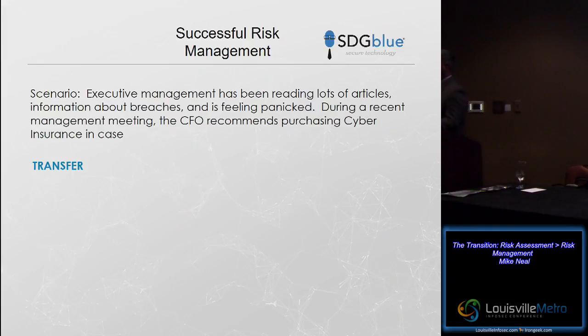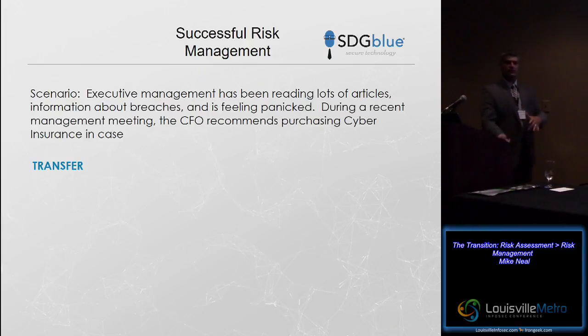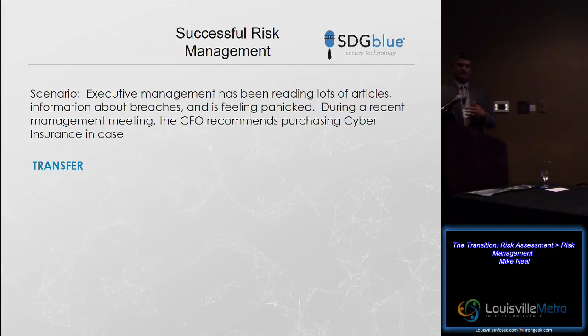So if I have a lot of backup tapes and I own those and it's IT's responsibility to get those out of the building and off-site every day, and they don't do what they're supposed to and they end up staying in the back seat of the car or whatever, I can transfer that risk to some courier service to take those tapes, get them over to a vault, secure them in the vault.